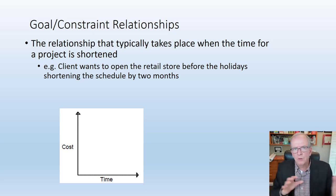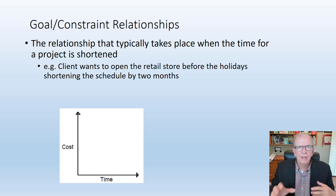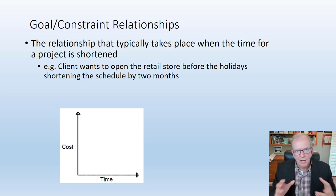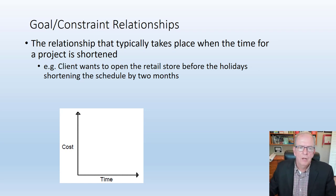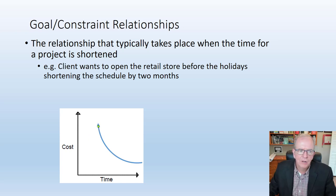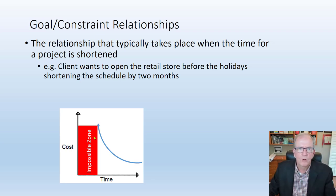It means we probably have more people on site than we normally would, so we haven't optimized the crew sizes and we're not getting maximum productivity and efficiency out of the crews. Maybe they're working long hours, so they're tired and more apt to make mistakes, more apt to have accidents. There's also a certain point where it doesn't matter — you're not going to be able to finish on time, and we call that the impossible zone in project management terms. You can throw all the extra money you want, but putting more people on it may only make it later because they're in each other's way — the stack effect, as it's known in project management terms.